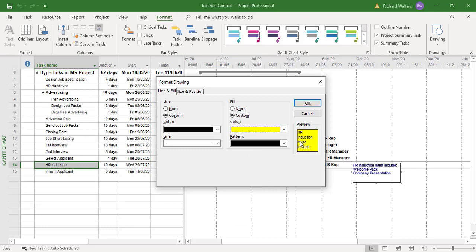Now you can also link it. Because if the tasks move around, say that this task was constrained and we move it on a bit, you want the task box to go with the task if it moves. So I want to go to size and position.